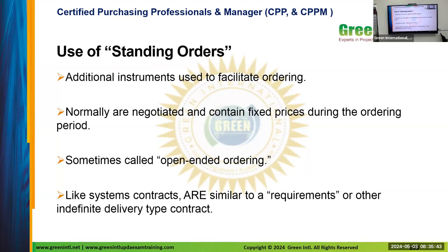That cannot be varied. Yeah, there are cases wherein there is a clause in the contract, like the prices will be variable, or there may be various techniques of pricing, maybe cost plus margin. The supplier will say, whatever index there is in the market, wherein the prices are mentioned every day.